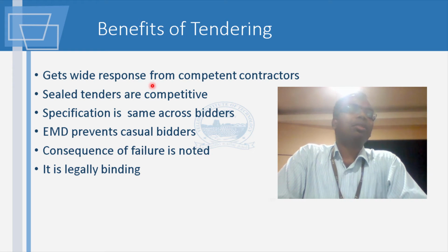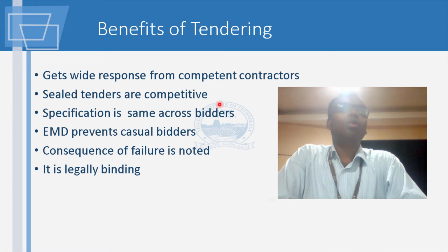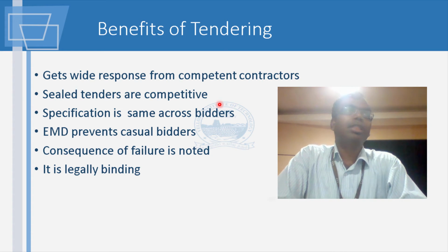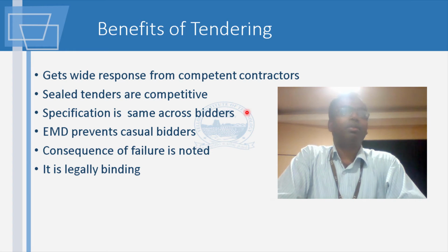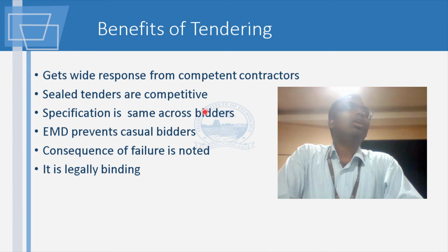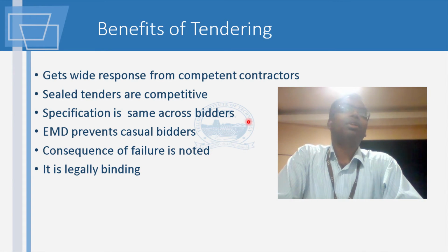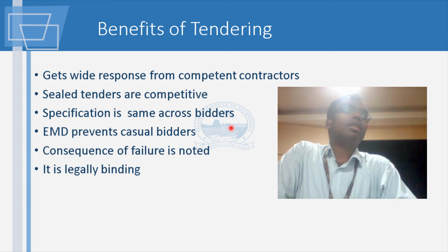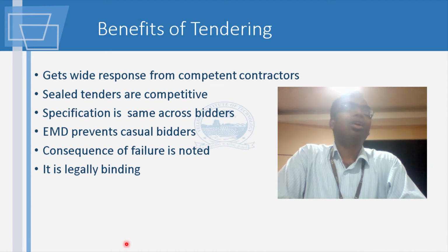So you can get a lot of response. Many people will respond to a tender document because many people want to make money. And these tenders are sealed. Nobody will be able to open it before the set date, and all the parties involved will be sitting at the table when they open the tender. The specification is the same for all parties. They'll say that you will have to use M25 grade concrete, this particular shade of color, this make of tiles. So specification is same for all.